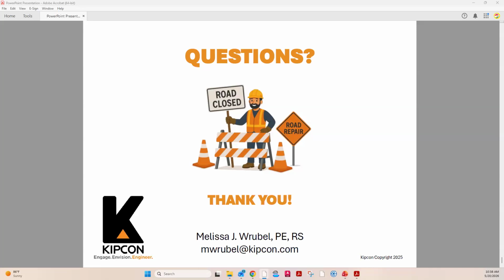I have another question. Given the length of time involved with the whole process, if the price increases greatly, is it possible to postpone or even cancel the project? Yeah, you certainly have that option. I have many projects that are phased, and sometimes the cost of the first phase alone causes them to say, let's put the brakes on for a year so we can regroup and see what the next steps are.